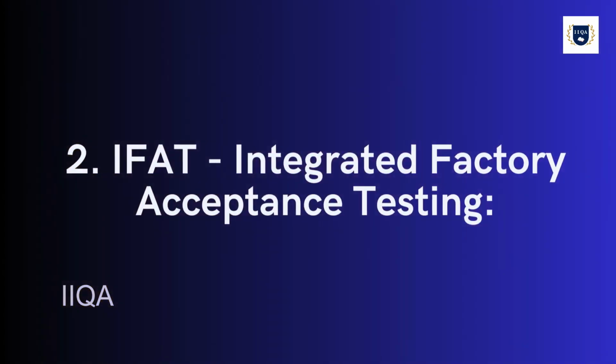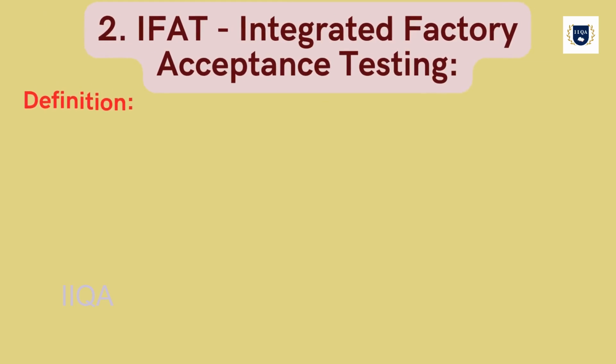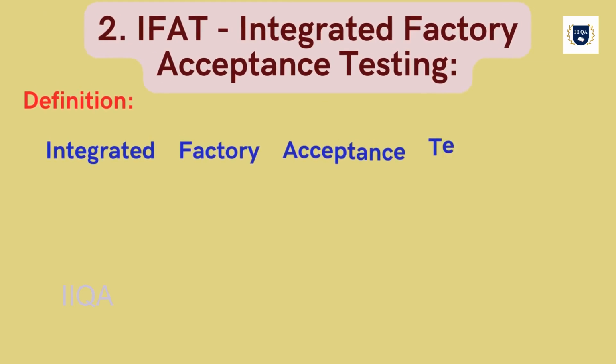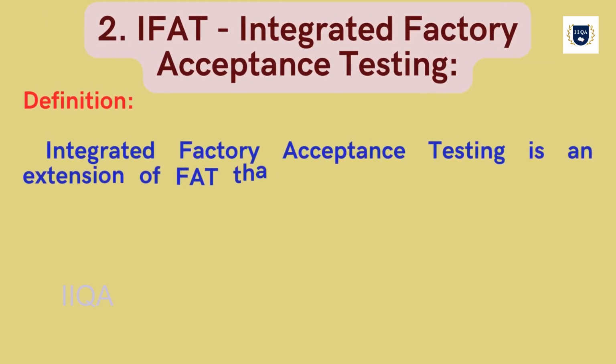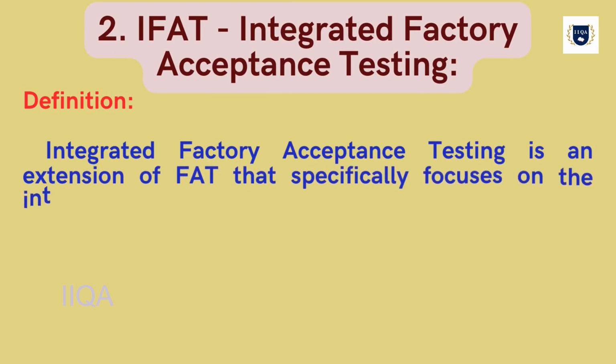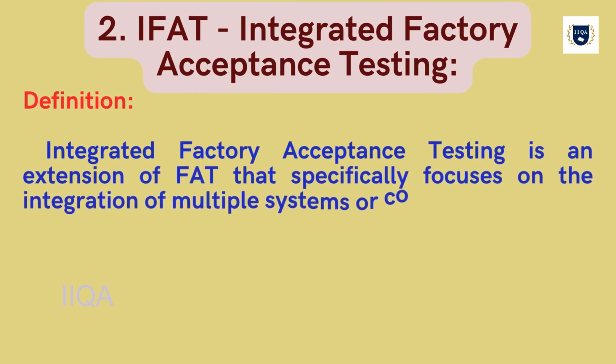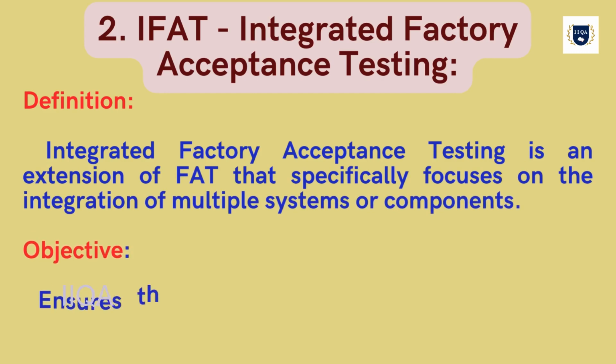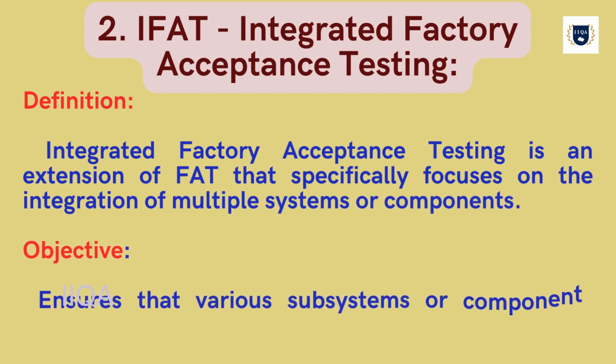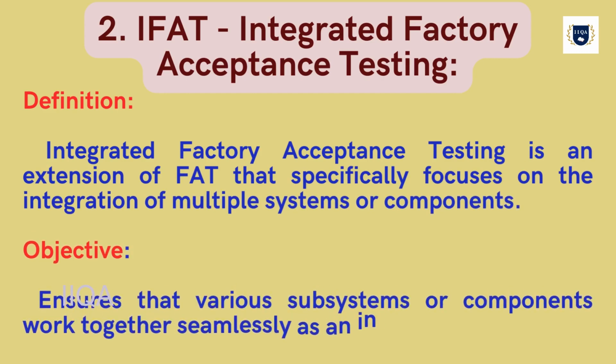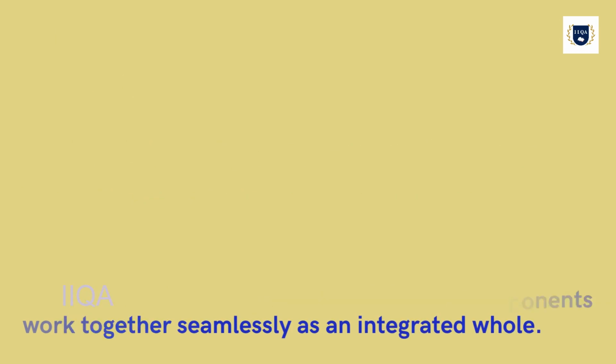2. IFAT, Integrated Factory Acceptance Testing. Definition. Integrated Factory Acceptance Testing is an extension of FAT that specifically focuses on the integration of multiple systems or components. Objective. Ensures that various subsystems or components work together seamlessly as an integrated whole.